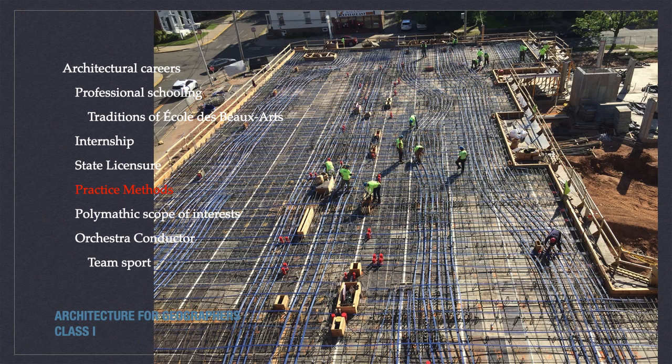A great deal of effort is also given to reviewing the work prior to its actual installation. Contractors are required to prepare shop drawings for specific trades, demonstrating that the work is coordinated with the other trades and also that it meets the design intent. And cut sheets or catalog specifications for all equipment are reviewed. Colors, textures, etc. specifications are selected at that time often,